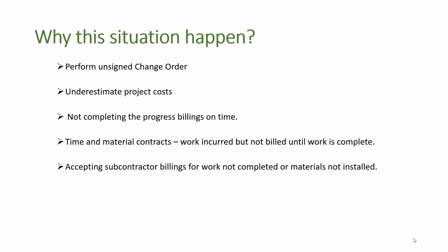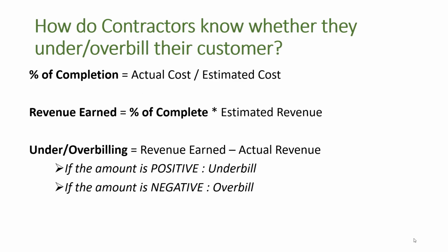Or sometimes we pay our subcontractor ahead of time, yet the job has not finished yet. We already pay our subcontractors, so we eat that cost ahead of time. That causes underbilling.